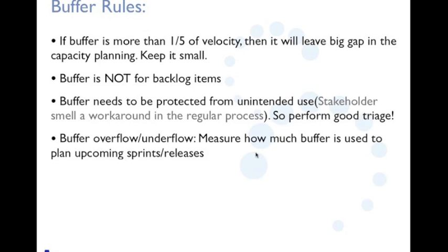And if it doesn't get used, then you always have a lot of activities that you could do as part of that. Either go back to the product owner and say, Mr. Product Owner, I can pick up these two smaller stories and deliver them. Or you could say that there are a few items that came out of our last retrospective that we would want to work on. Make all these options possible, but definitely do it in the later part of the sprint, assuming that you don't get any unplanned work or any production emergency in that sprint.